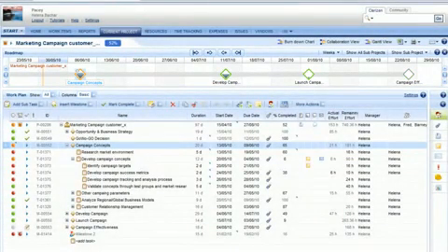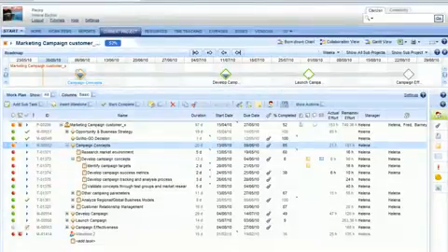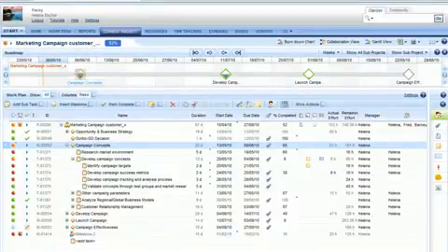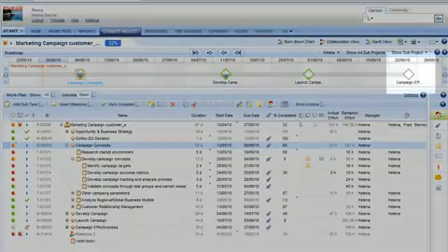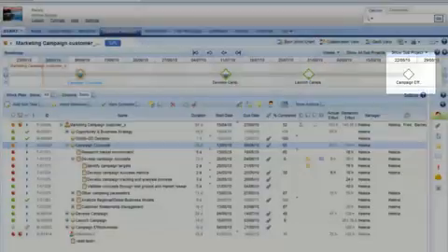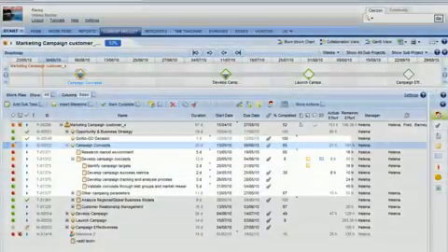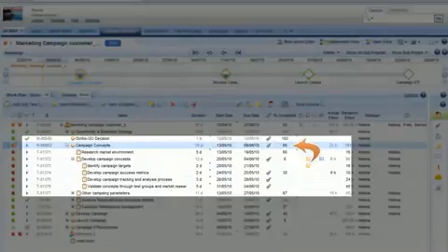The project roadmap gives you and your team full visibility into the progress of the project without needing to view each individual work item. Basically, this is a bird's eye view of the project itself. Each milestone is represented on the roadmap timeline based on the milestone due date. The milestone color represents a scheduling status and follows a green, orange, or red color coding. Gray milestones represent drafted work items that have not yet been activated. Once progress is updated on the task level, it is rolled up into the parent milestone and is then represented on the roadmap with the milestone fill.